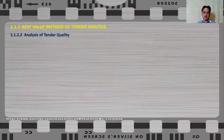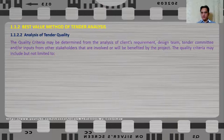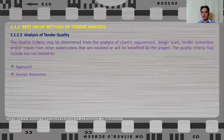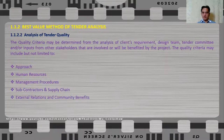Let us analyze the tender for its quality. The quality criteria may be determined from the analysis of the client's requirement, the design team's requirement, the tender committee, or inputs from other stakeholders. The quality criteria may include but are not limited to: the approach — does the tenderer fully understand the project requirement; human resources — the staff assigned and their qualifications; management procedures; subcontractor and supply chain; and external relations and community benefits.